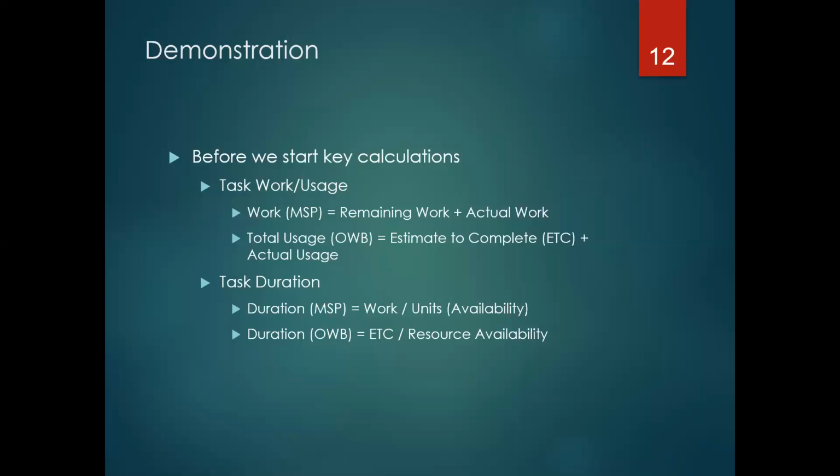So for the month of March, I could be available 80% of the time. For the month of April, I could be available 50% of the time, and it will be sensitive to my availability and will elongate the task as it drifts into April because I have less availability. And then if I have higher availability the following month, it'll shrink the task based on my availability.